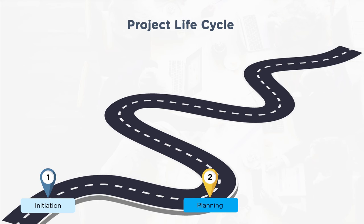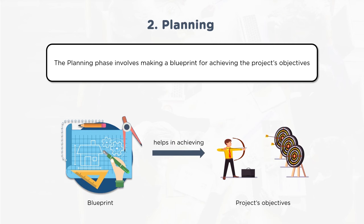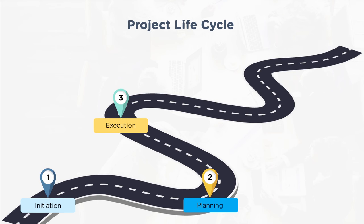Once it is confirmed that a project should proceed, it moves to planning. In a waterfall approach, planning requires clear articulation of the entire project — a comprehensive, holistic view. In an agile approach, you may have a big skeleton and deep-dive into detailed planning in each iteration. Planning provides a clear blueprint of the project's objectives, which becomes a reference point throughout the project life cycle.